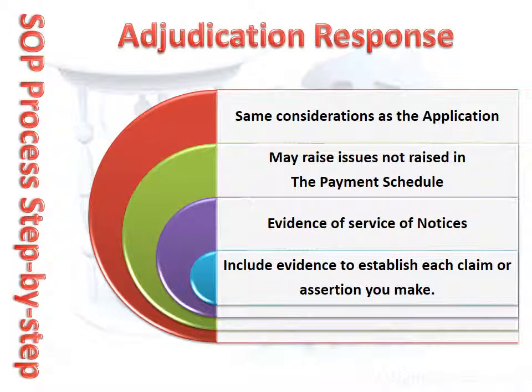The adjudication response can only be lodged and served when the client has provided a payment schedule. Even then, except in Victoria as previously explained, the client can only raise those issues that have been raised in the payment schedule. Apart from that, the points and advice given for the preparation of the adjudication application apply to the adjudication response.